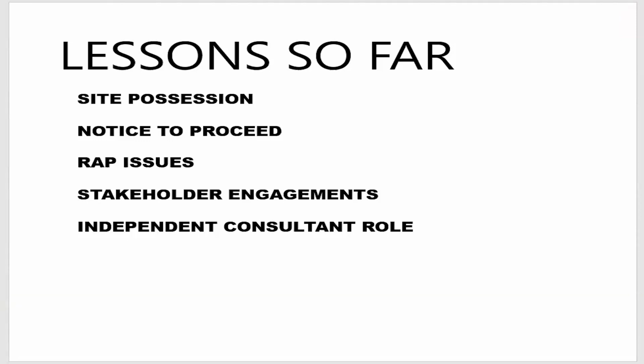So we've given him possession of site for the network, which means that he must meet the maintenance standards. There should not be any potholes and the road should be motorable. So that is what it means for the whole section.